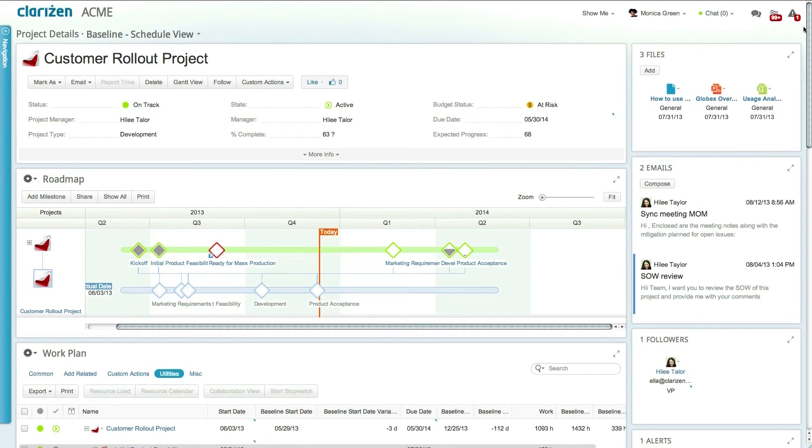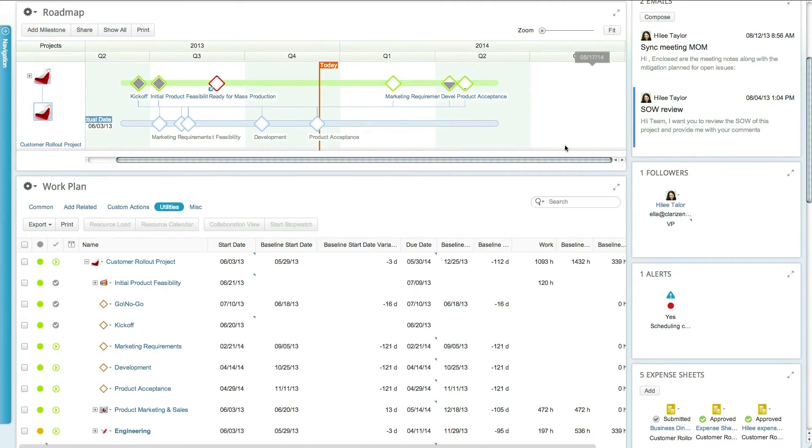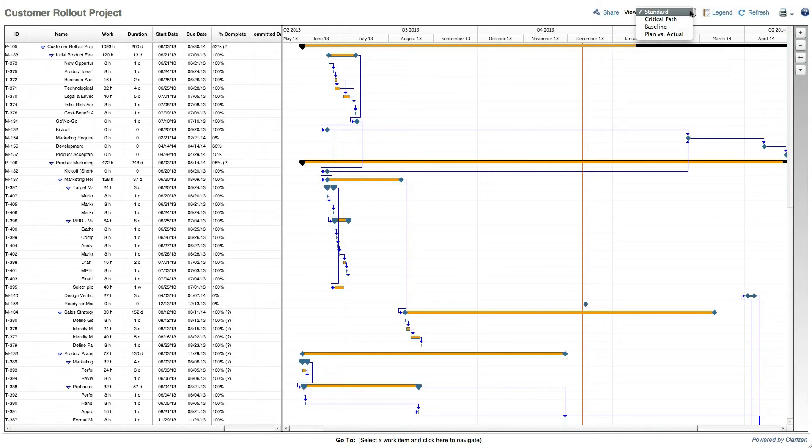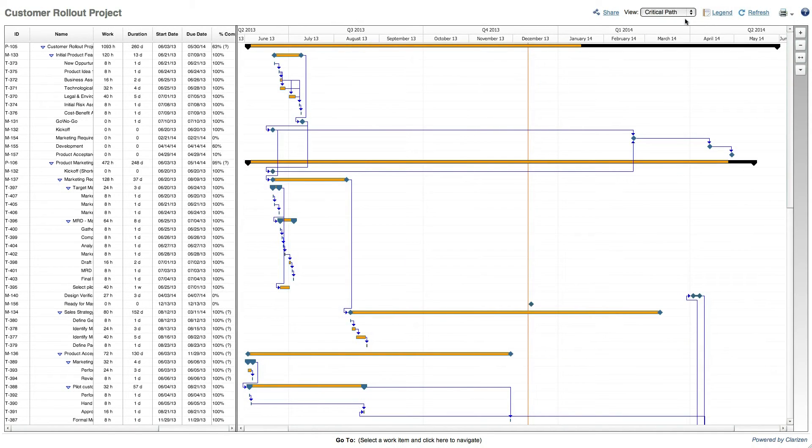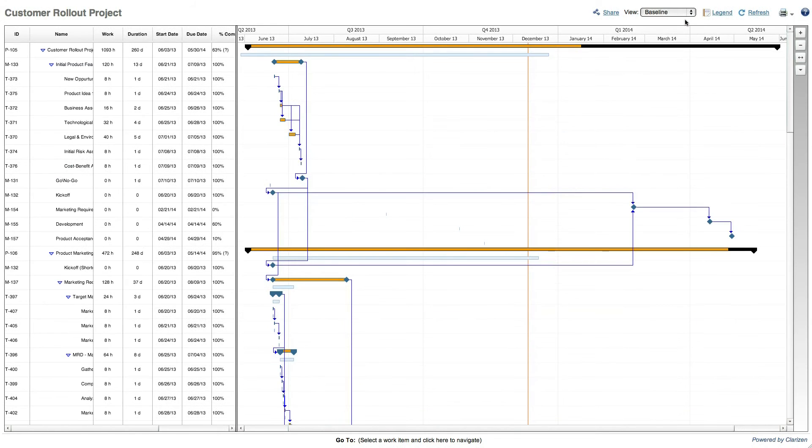Similarly, you can also choose to view the project Gantt view. The Gantt allows you to switch between the standard view which displays data according to planned scheduling parameters, the critical path view which highlights the work items that are part of the critical path, and the baseline view which shows the Gantt according to the baseline snapshot.